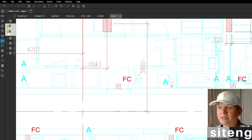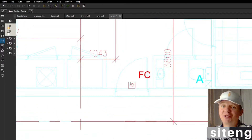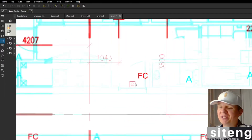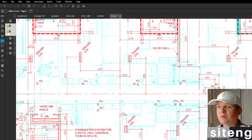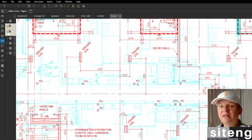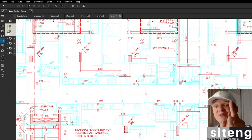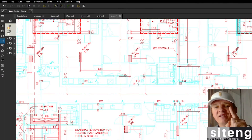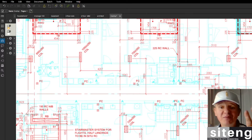As you can see, we have a bathroom here so that penetration makes sense, and the penetration next to the toilet bowl makes sense as well. But we're missing this on the structural drawing, and instead we have an opening showing in the middle of the door. That's why we're going to ask the question to confirm the position.